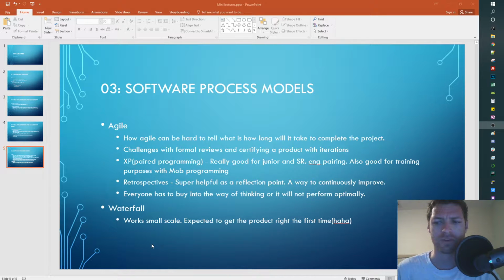Maybe, for example, a true course project that I'll probably be referencing in most of all these things is we came up with different types of models of what we expect, maybe how many requirements and how many lines of code. It starts from the system level requirements. How many system level requirements are we going to have? And then we create a model per feature or functional area that, based off of the system requirements, we'll have X number of high level requirements. Then based off of each high level requirement, we'll have X number of low level requirements. And then based off of that, we'll have X number of lines of code and then X number of test cases based off the requirements and test procedures and so on and so forth.